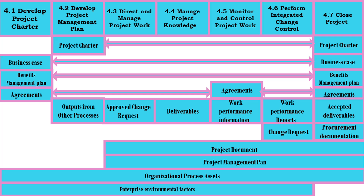Organizational Process Assets that can influence Direct and Manage Project Work include organizational standard policies, processes, and procedures; issue and defect management procedures; issue and defect management database; performance measurement database; change control and risk procedures; and project information from previous projects such as baselines, calendars, project network diagrams, risk registers, risk reports, and lessons learned repository.